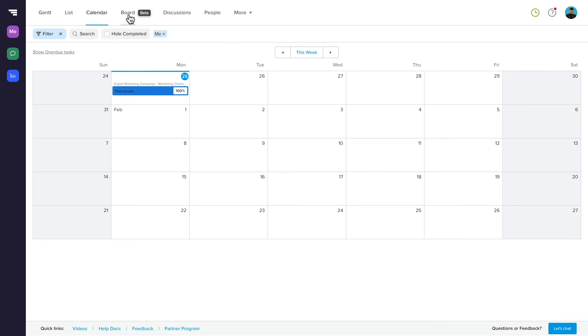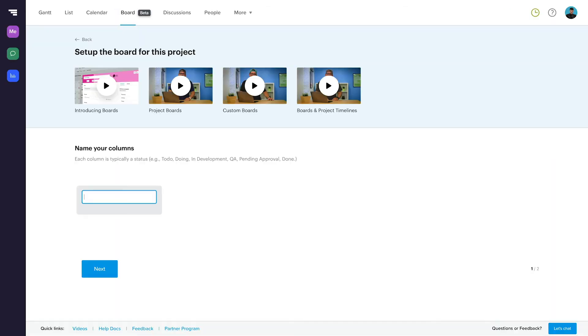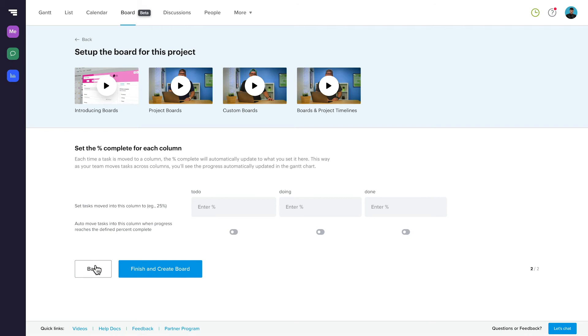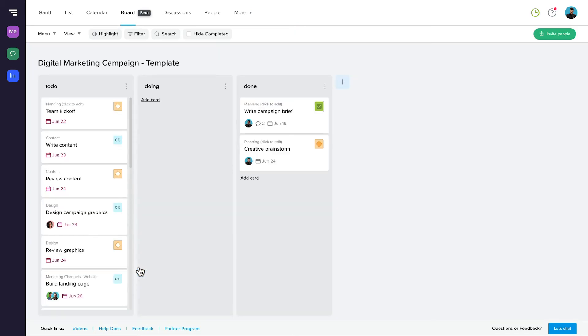We can head back up to the navigation bar and select Board View, where you can view your project as a Kanban board. If you haven't already set up your project as a board, you'll be asked to name your columns, and if you'd like to set a completion percentage to any columns. So as you move tasks through your board, the completion percentage will automatically update.